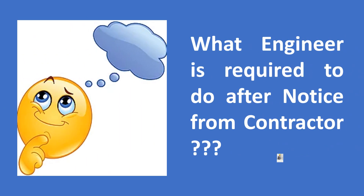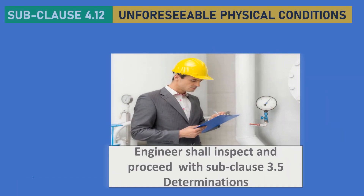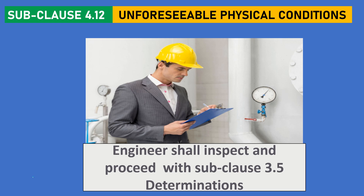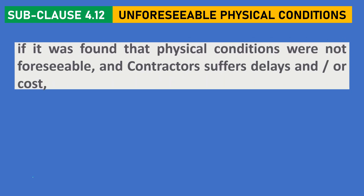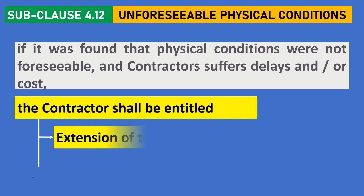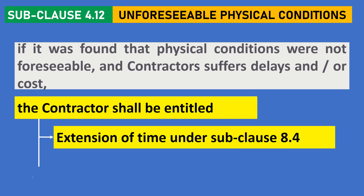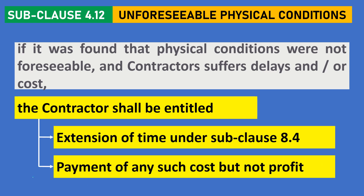After necessary notification from the contractor, what action is required to be taken by the engineer? First of all, the engineer shall inspect and proceed with the subclause 3.5 determination. And if it is found that the physical conditions were not foreseeable and the contractor suffers delays and/or cost, the contractor shall be entitled to an extension of time and payment of any such cost, but not profit.